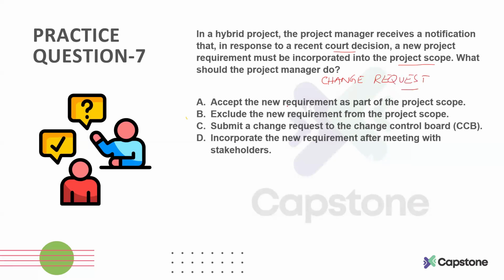Whenever a new change comes, your first step is to update your change log, do the impact analysis, and then, based on your analysis, submit the change request to your change control board for their evaluation.